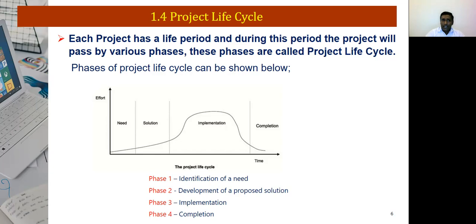In a feasibility study, we will be discussing the possible benefits and the cost. And if the benefit is more than the cost, then we will be able to go ahead with the project. And that is where we will be having a project team. From there onwards, we will be drafting the project initiation document, which will have a vision as well as a business case.